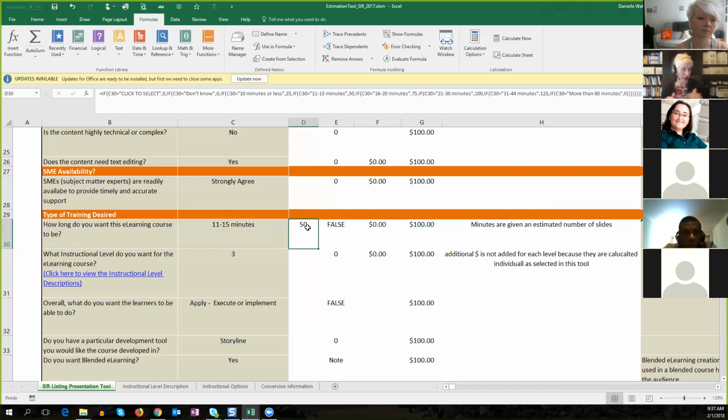We tend to bill at those milestones. But something I incorporated was that we always do a project kickoff charge, because I was having issues where clients would not get started the way they said they were going to. So at least it gives me some revenue to get going. That way, if they drag their feet and we get a slow start, I still got paid to get the project going. Yeah, and it gets them a little more invested because they've got some skin in the game. Yep, totally.